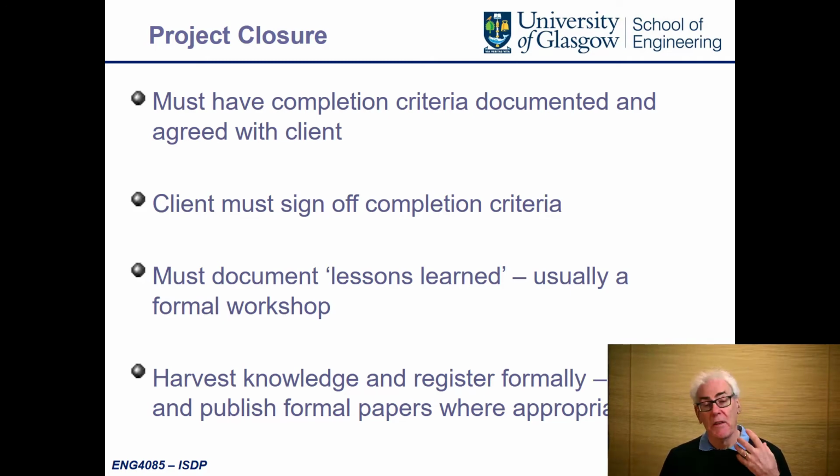You have identified that some parts of the civil engineering requirement failed because someone did not carry out a task. It's better not to make the issues too personal, but it's very important to do a lessons learned after the project. And in working in the commercial environment, you would gather that knowledge together and formally register it and publish papers on why and what went wrong and went well within your project, because there'll be many aspects that went well with no incident, and it's important to record what you did well as well as what you did badly.